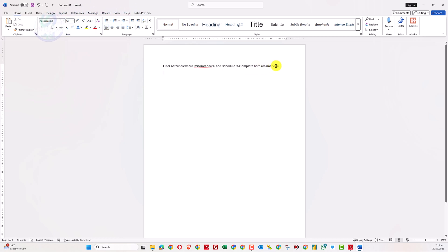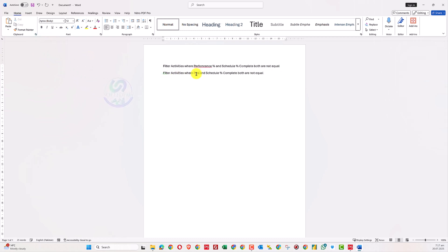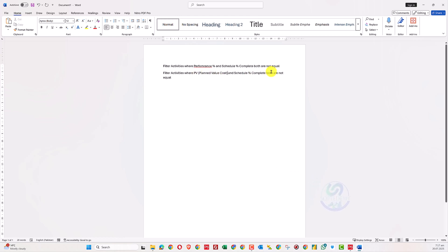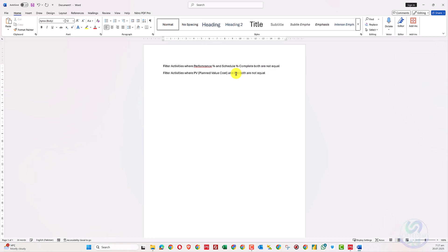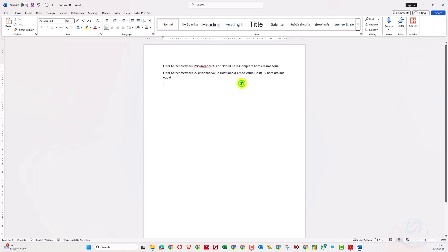There can be two types of questions here. One is about planned value cost (PV), which is basically scheduled percent complete. The other is earned value (EV), which is performance percent complete. This is now trending in Arab planning communities.